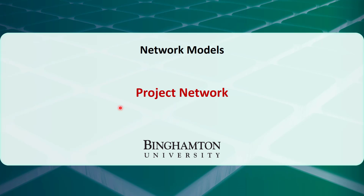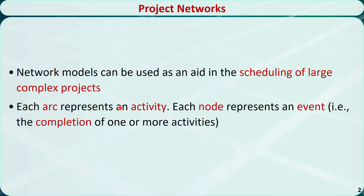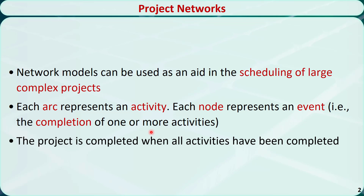In this video, I will talk about how to create a project network. Large projects can be represented by network models. In a project network, each arc represents an activity, and the arc is associated with a duration. Each node represents an event — the start or the completion of one or more activities. The entire project is completed when all activities have been completed.